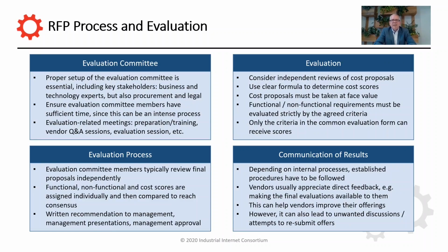Another key thing to look out for is the evaluation committee. So how do you actually set up the evaluation committee? Who do you include from a business and technology point of view, from procurement, from legal, etc.? How do you ensure that the people assigned to the evaluation committee have sufficient time available to support the intense process? And how do you structure, for example, the evaluation related meetings in terms of preparation and training for the evaluation committee, making sure that everybody is on the same page in terms of requirements and criteria and so on?